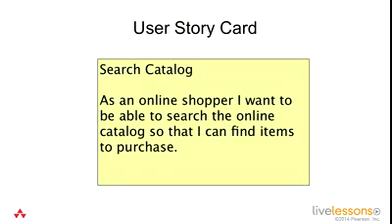Often, user stories are written on cards. On the front of the card, you write some kind of descriptive title and then the story with those three elements we just discussed. They usually get put up on a wall where you can order them and make that your product backlog. Now, that will work for a company that's all co-located and can see all the same information. Once you start getting distributed, you may want to have some type of digital representation of this, but the user story card is still a great metaphor for how to capture these requirements.